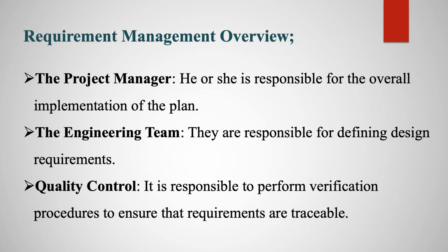Also we should understand requirement management. So have a look at this slide. I'm going to briefly explain an overview of requirement management. Okay, so the project manager is responsible for the overall implementation of the plan. The engineering team is responsible for designing the requirement. And the quality control team is responsible for performing the verification procedure to ensure that requirements are traceable.